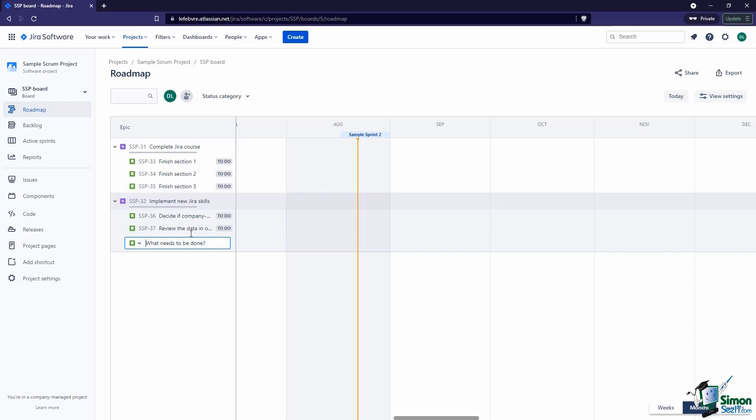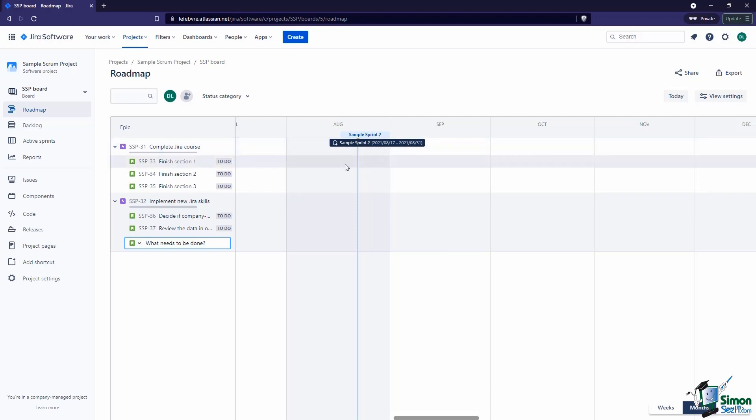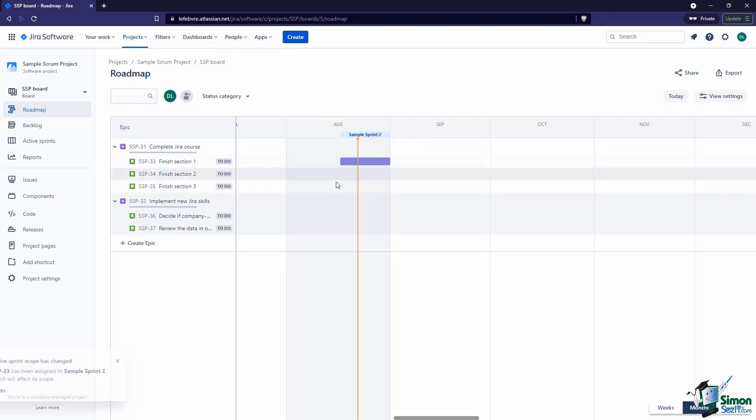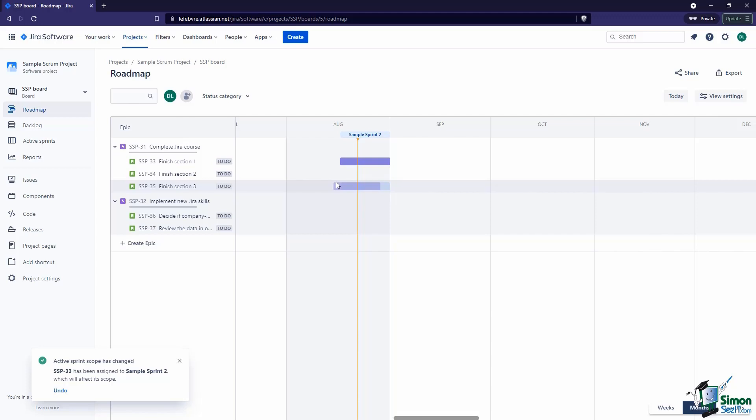Then what happens here in the Roadmap is we can start to track some of that. You can see we already have a sprint on here—this was a sprint that we created earlier in this course. We could say, you know what, let's drop this one here into that sprint. Right now, Jira is going to say that scope has now been changed because this sprint is actually active.